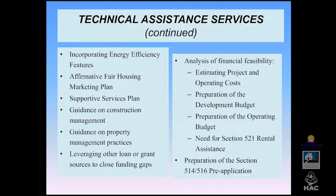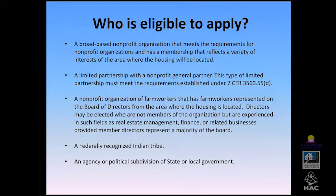Another aspect of technical assistance is analyzing the financial feasibility of the project. We provide guidance on estimating project and operating costs, and preparation of the development budget and operating budget. These costs drive the need for Section 521 rental assistance. The rental assistance offered on 514-516 projects is one of the few programs that still offer project-based rental assistance — a rare and valuable benefit.